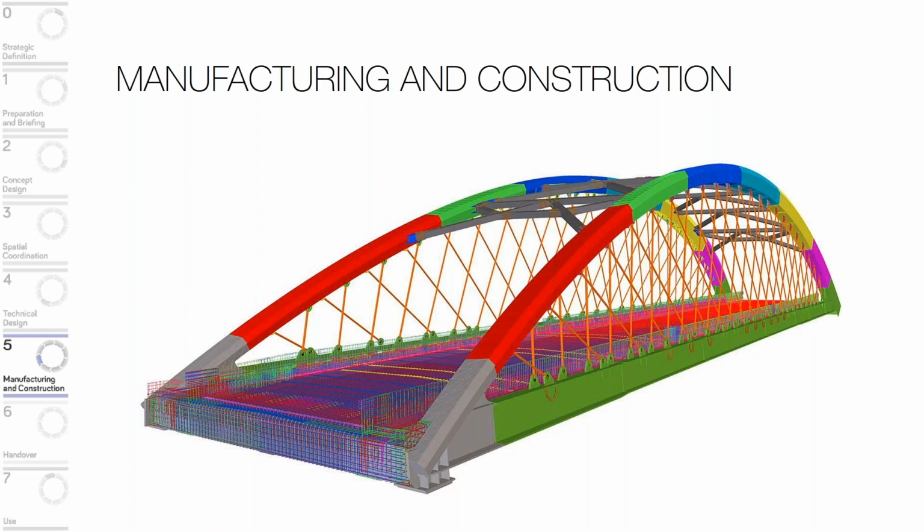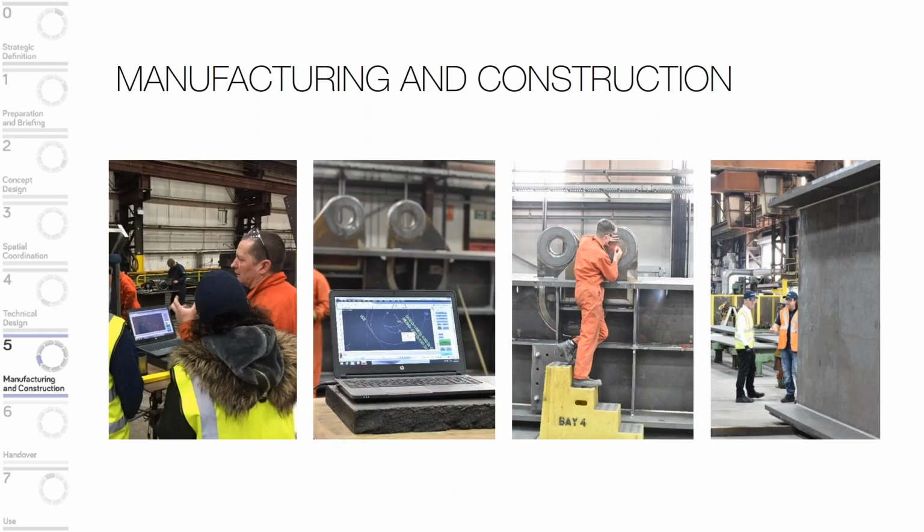So this process was led by the contractor, stage 5, as you'd expect. We had some really good input from AECOM and McDonald's, who were the engineers for it. And they created this structural model of the bridge, which had quite a lot of information attached to it. This modelling enabled them to reduce the amount of 2D drawings that they produced. So they took the model and then, using technology within the fabrication yard, were able to use computers and laser scanners to set out the fixtures, fittings and connections very accurately on site.